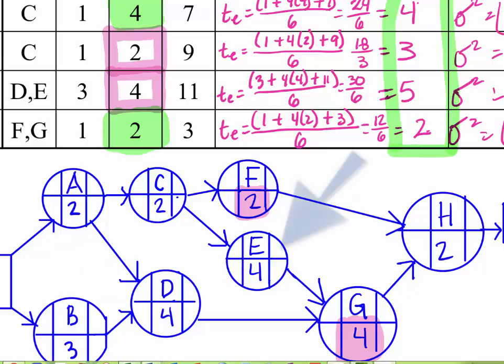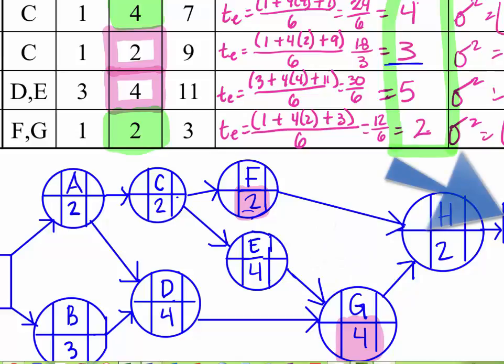And then we've got E and F, and I reversed these again just like I did in class because I knew it was going to be easier to draw. So F is on top, and you notice I have this one in pink, and that's because the F time is different. Before it was 3, but now it's 2. So I have that on there. And then G, you'll notice, is also one that had changed just like F, so I have that in pink. And then H needs to be preceded by both F and G. And then over here I've got the end. Here's the start.